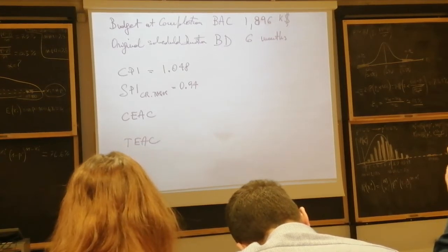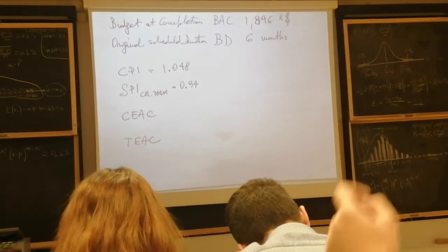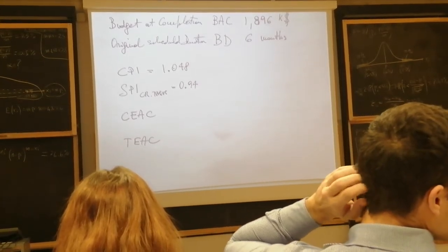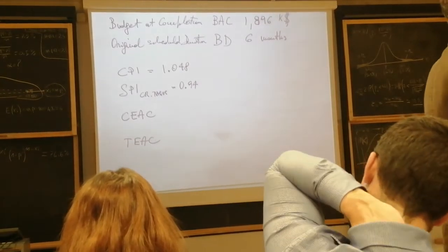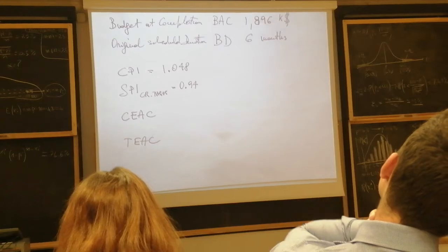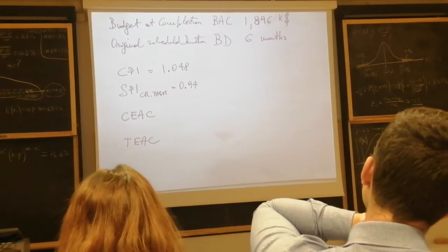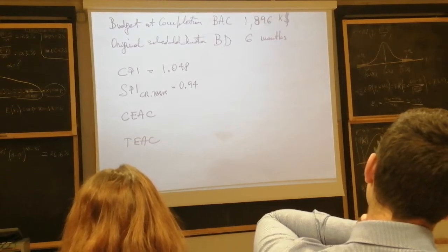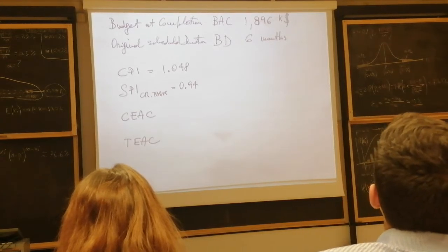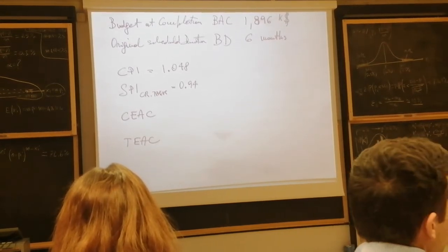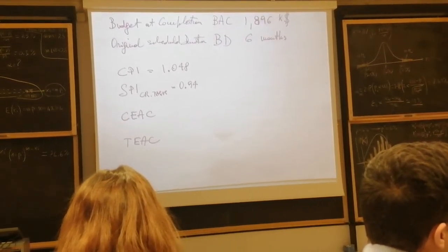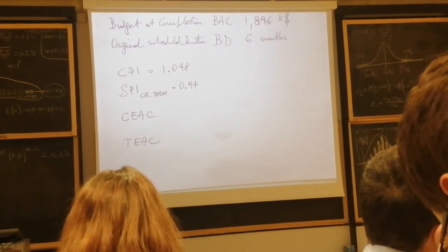Maybe. So again, sorry, your name is Chiara. So Chiara is suggesting to use the ratio between 6 months and the SPI. Why? Because the SPI is the ratio between the budget and the actual value. Better than that, SPI is the ratio between the work performed and the work scheduled. So it's an expression of how efficient we are in delivering the project, how fast.